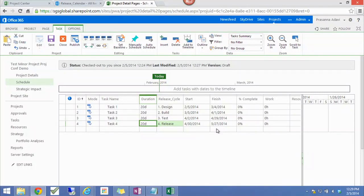Would you be able to go back into each project and ask, do you really have this scheduled as a milestone or not? I'm not saying milestone is a bad practice. I'm just accommodating for the lack of it. Yes, so if your release process defines, okay, in my release process I have 6 steps, then there should be only 6 tasks in whatever size schedule you have that pertain to that. And then it may or may not be a milestone. If you can do the milestone thing, that's even better.